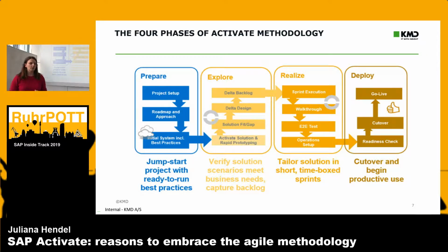Explore phase is all about two different kinds of workshops. The first workshop is the solution validation fit-gap workshop. There we showcase our solution, what we already have with best practices, and we go through each scope item.